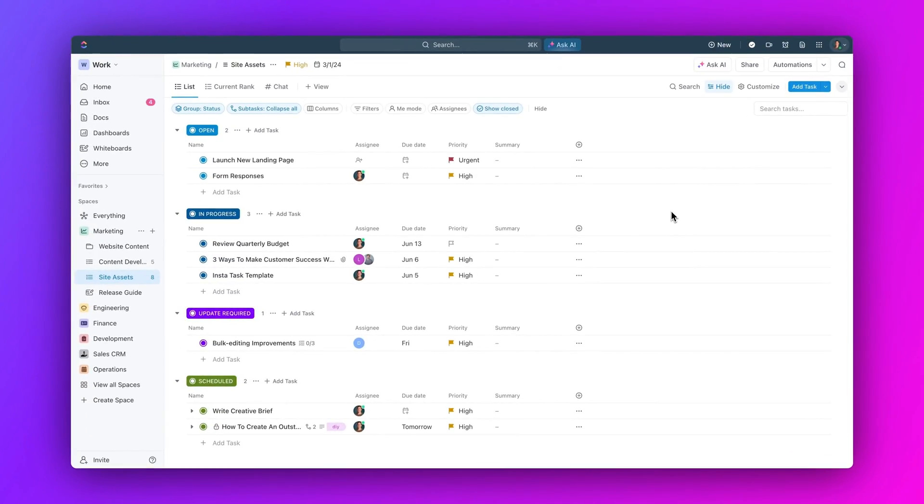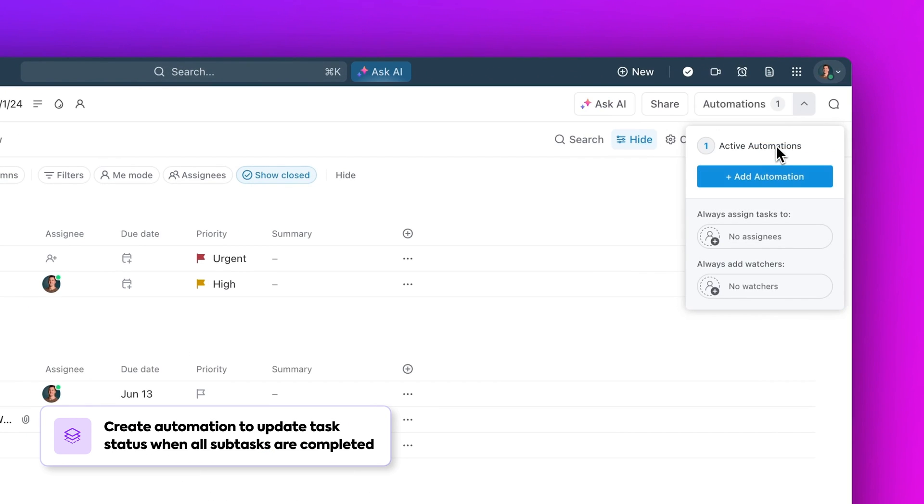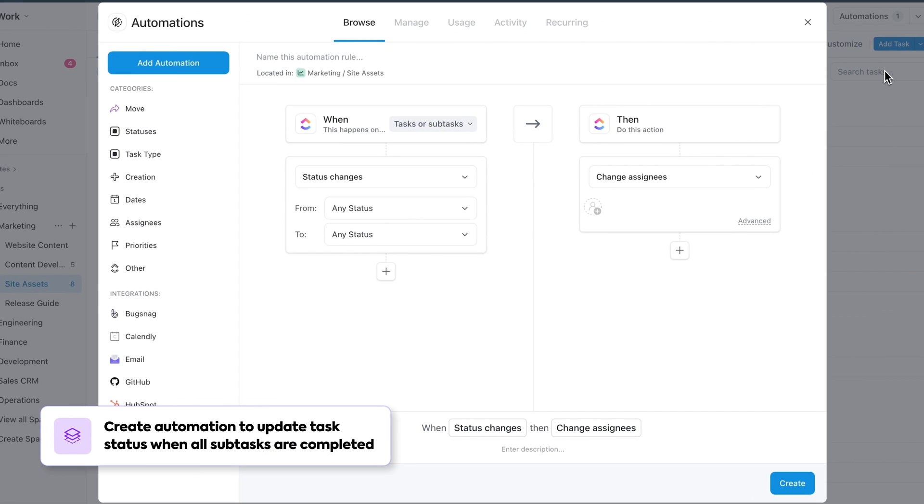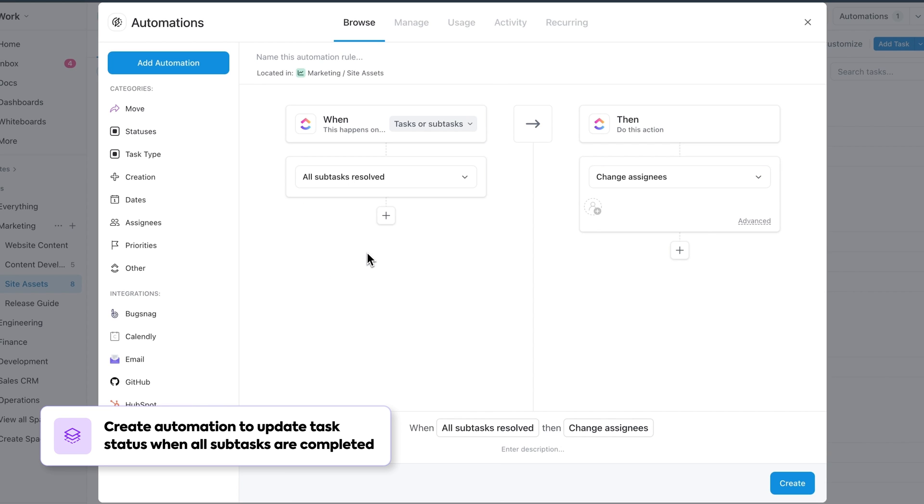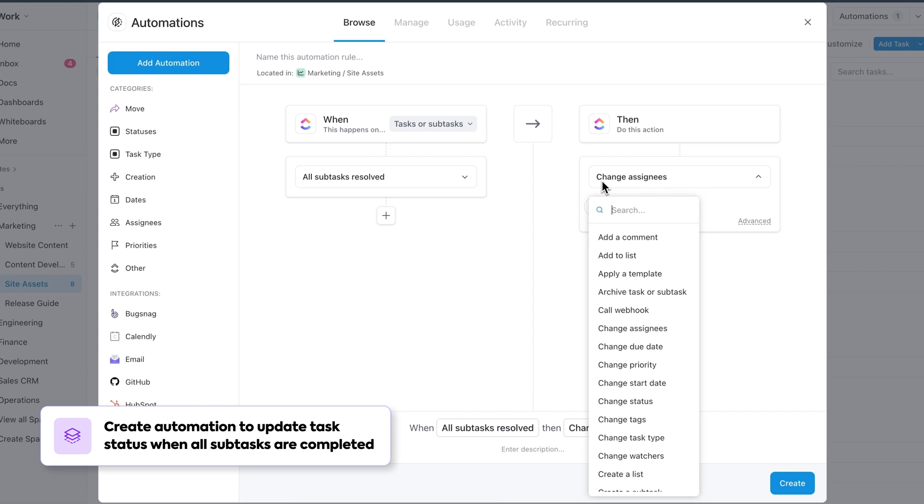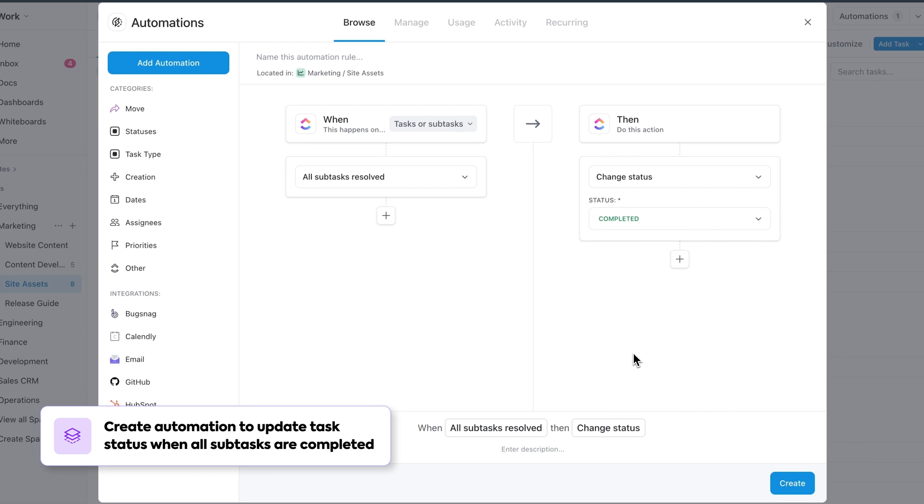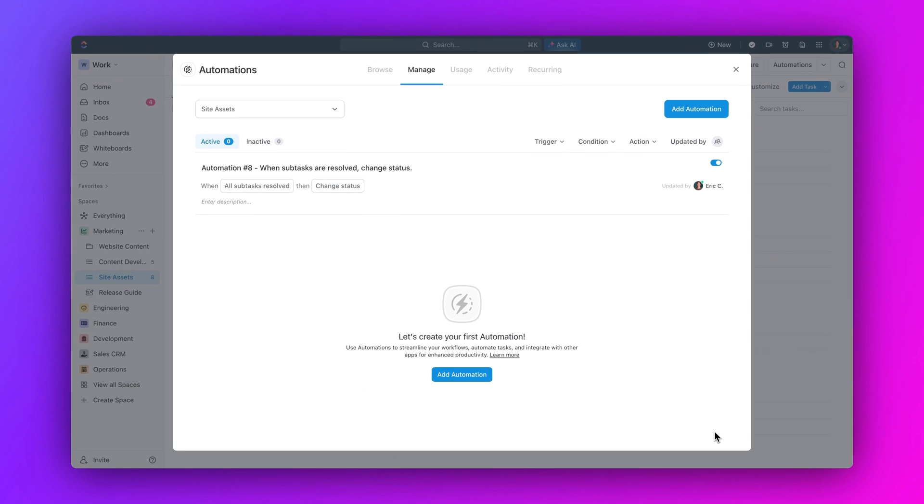First, with project management. Let's walk through a couple examples to help you get started. Let's say you want a task status to update once all subtasks within it have been completed. To set this up, set your trigger to when all subtasks resolved, and set your action to change status. Then select the status you want your tasks updated to. And just like that, your automation is ready to go. Make sense?